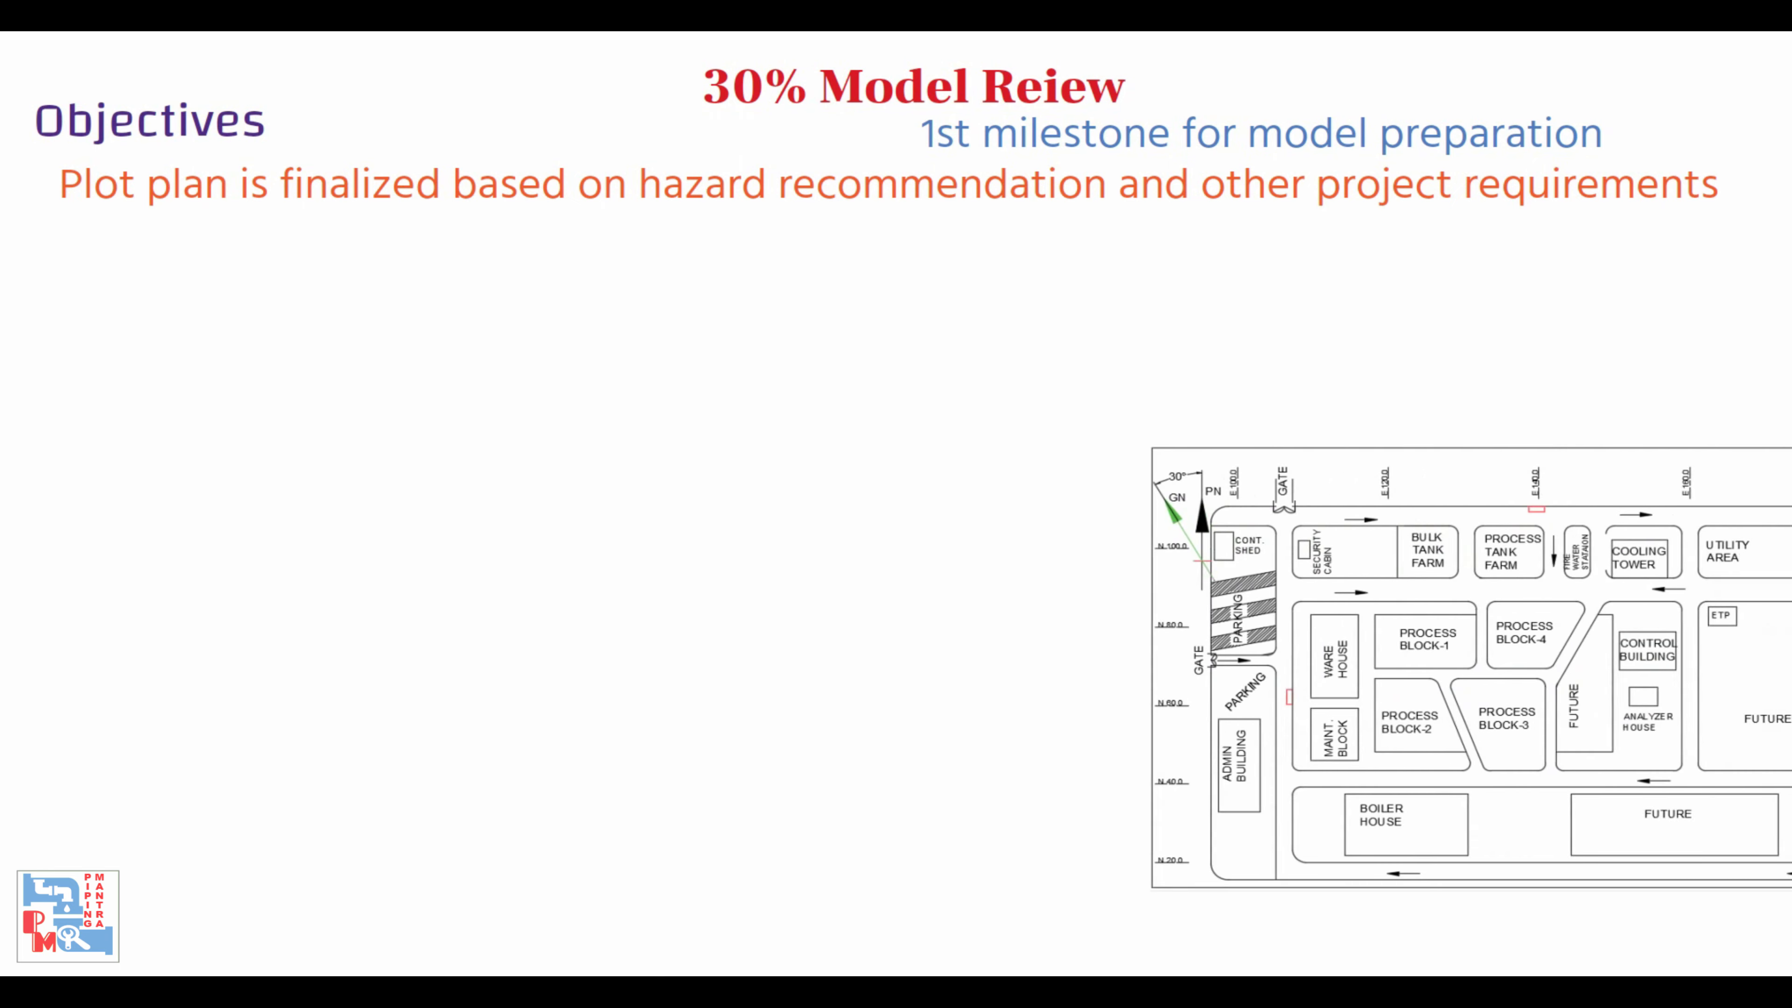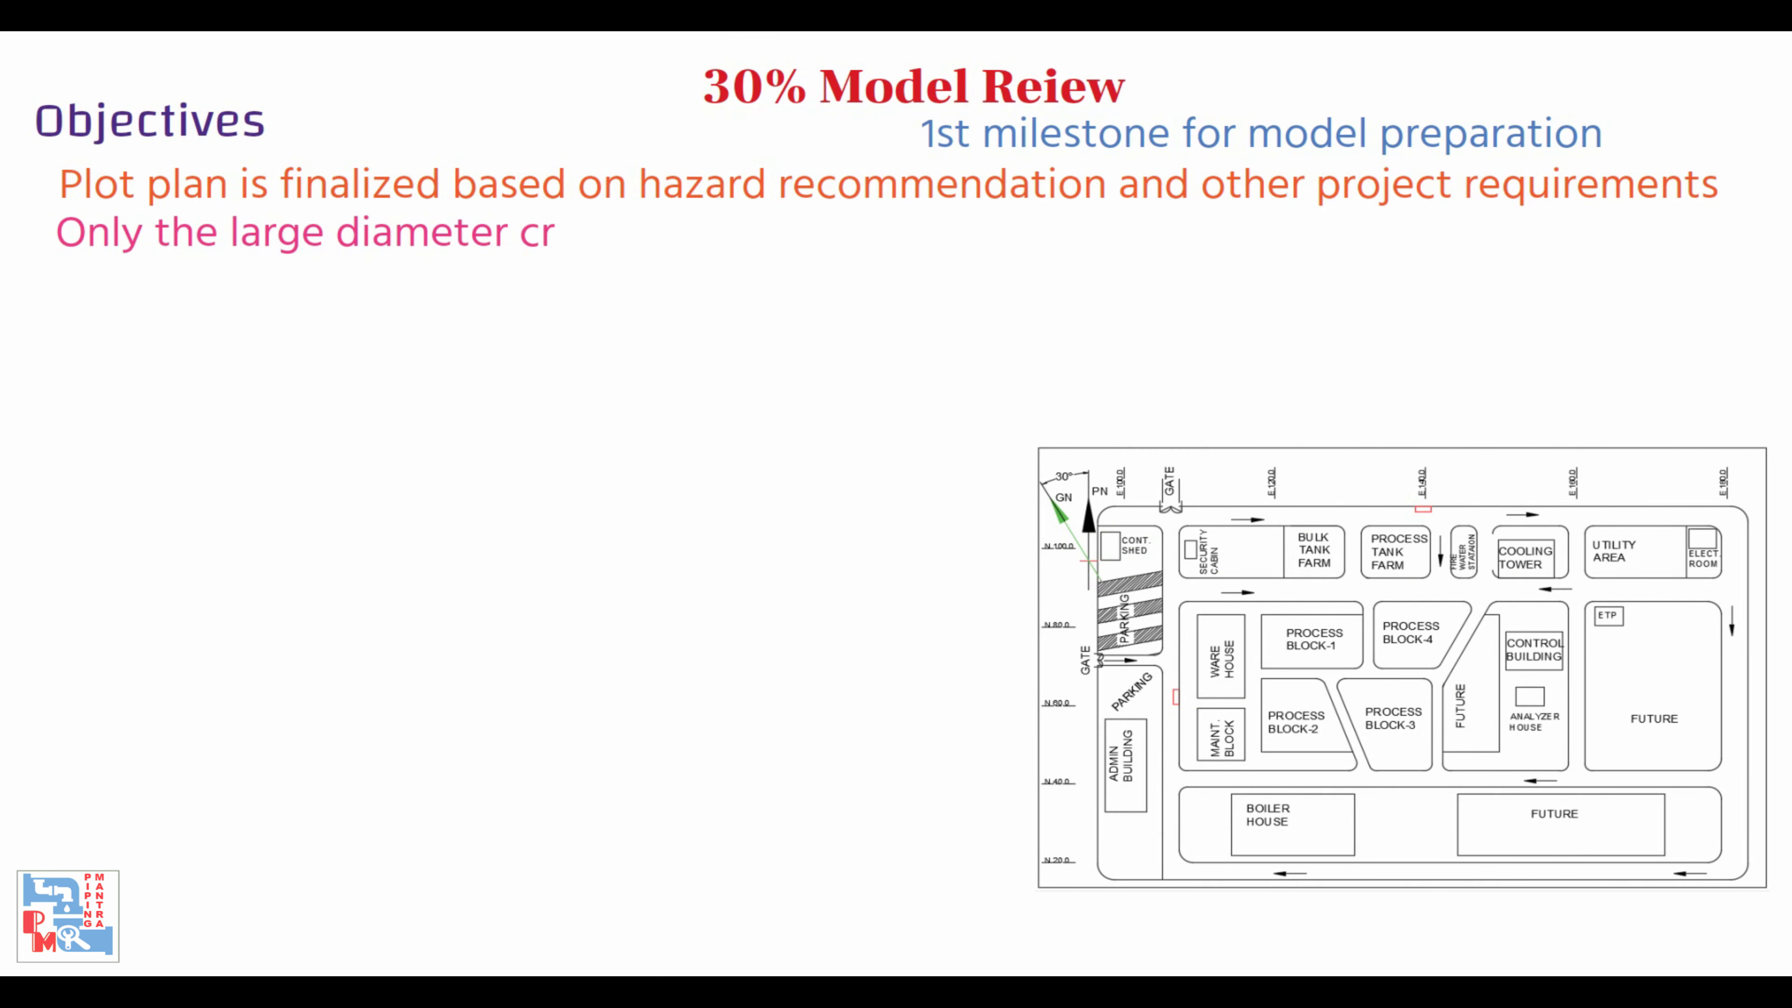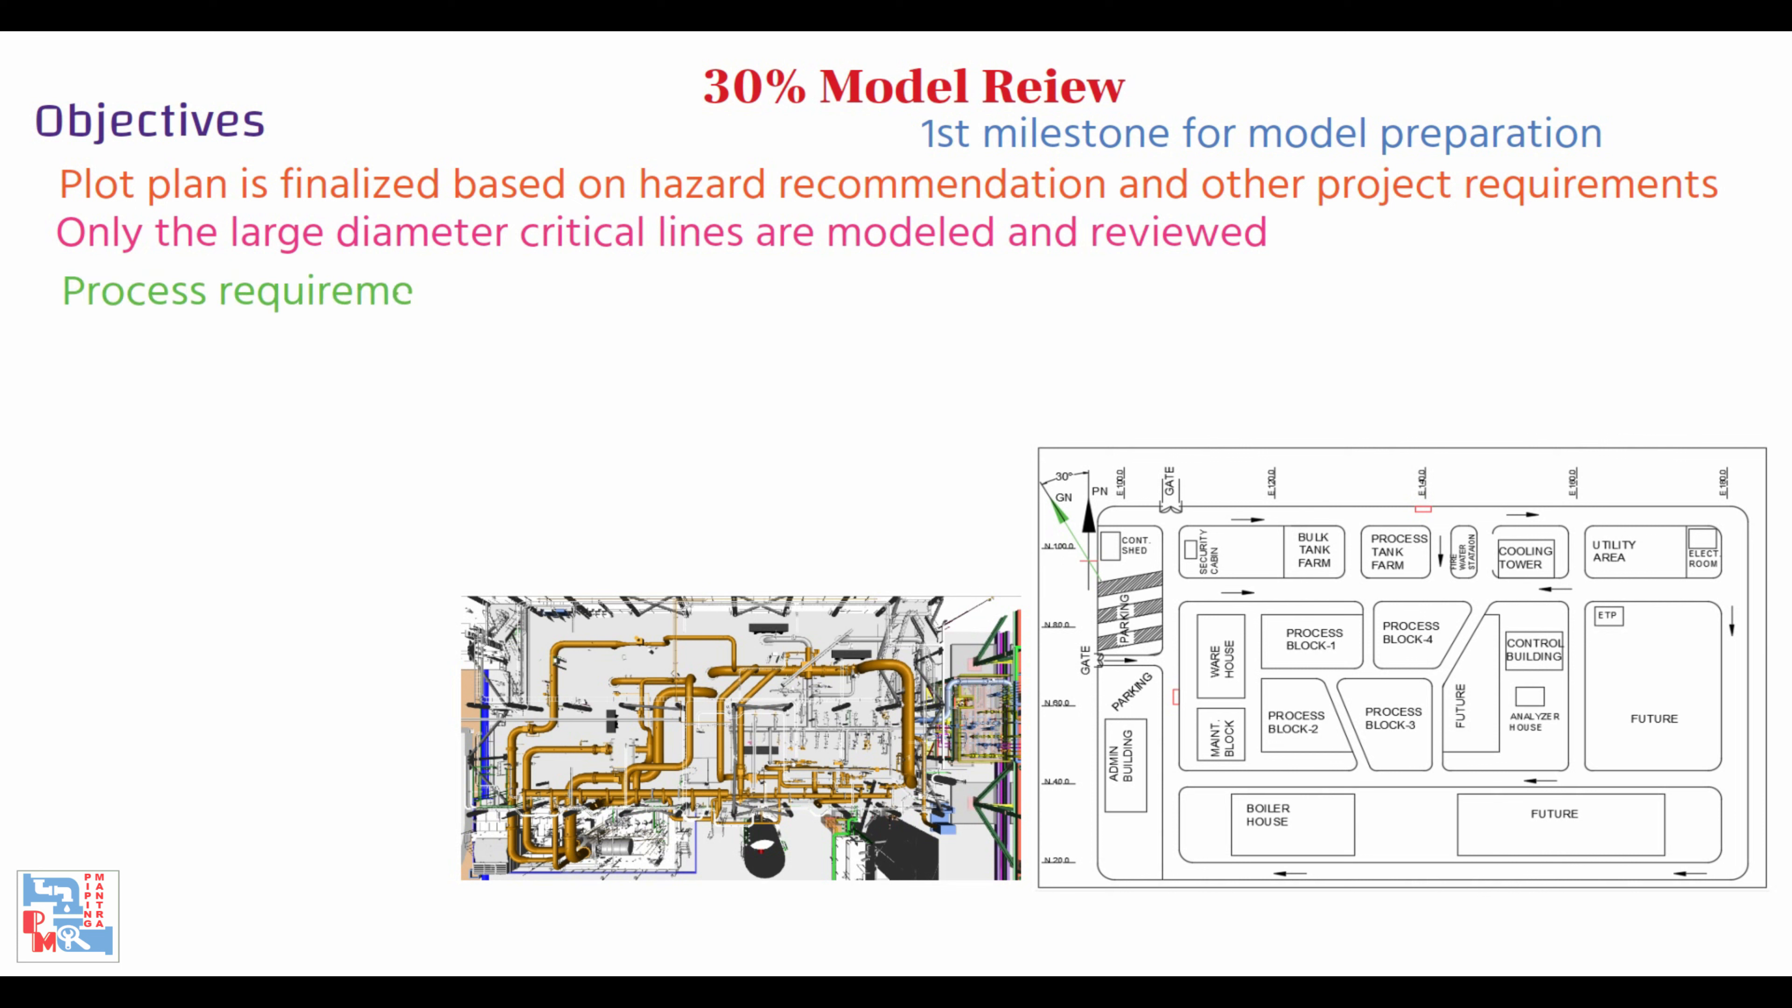Now let's see about 30% model review. A 30% model review means the first milestone for model preparation—all the design data is not available at this stage. At this stage, plot plan is finalized based on hazard recommendations and other project requirements. Only the large diameter critical lines are modeled and reviewed as per process requirements like free drain or no pocket requirements, and according to these the location of equipment is finalized.